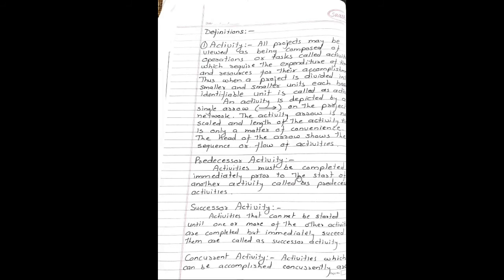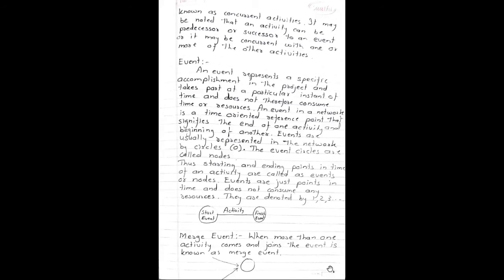Predecessor activity: Activities must be completed immediately prior to the start of another activity, called as predecessor activity. Successor activity: Activities that cannot be started until one or more of the other activities are completed but immediately succeed them are called as successor activity. Concurrent activity: Activities which can be accomplished concurrently are known as concurrent activities. It may be noted that an activity can be predecessor or successor to an event or it may be concurrent with one or more of the other activities.